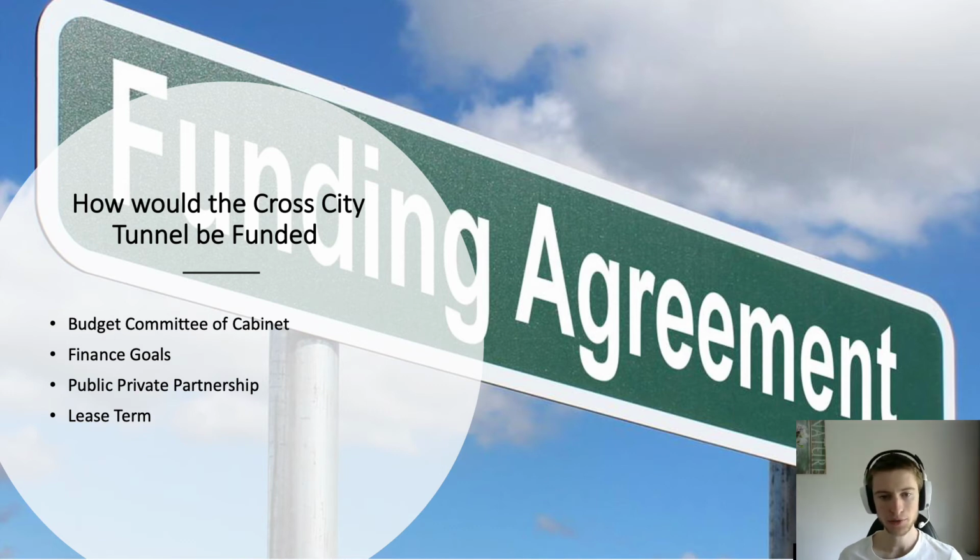At the time the project was undertaken, the government was focused on debt reduction, which led to a policy of no net cost to the government. Therefore, the project would be funded under a public-private partnership with private entities operating and maintaining the tunnel until 2035. This resulted in the end users who would ultimately pay for the project through tolls not being adequately considered.